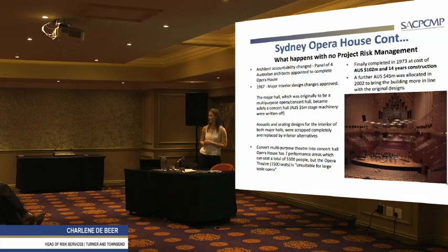At that stage, they had to write off about $5 million Australian dollars worth of machinery, which was redundant then. They weren't going to use it, they've procured it, and now they physically just have to write that cost off. Now, from a risk point of view in corporate, that means it is imprudent spending, it's wasteful expenditure. From a corporate governance point of view, it's not that easy to let it go.